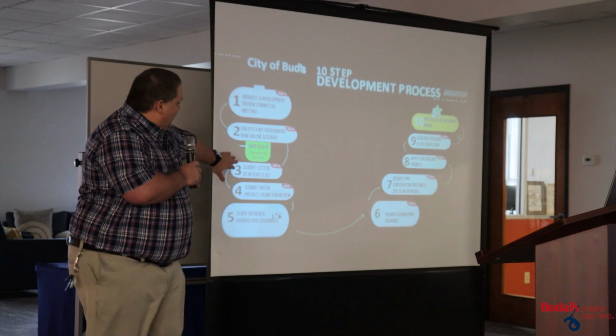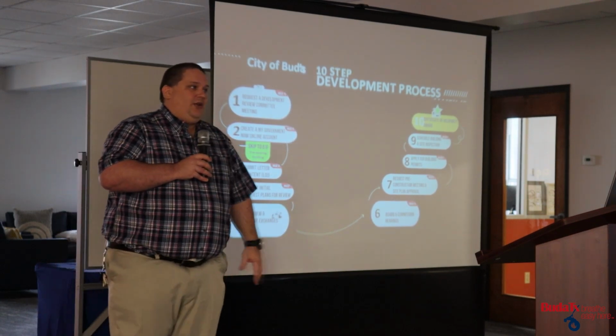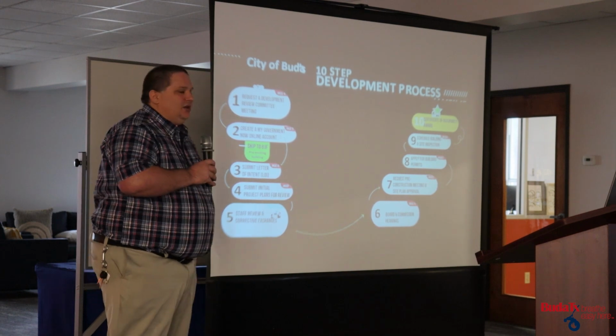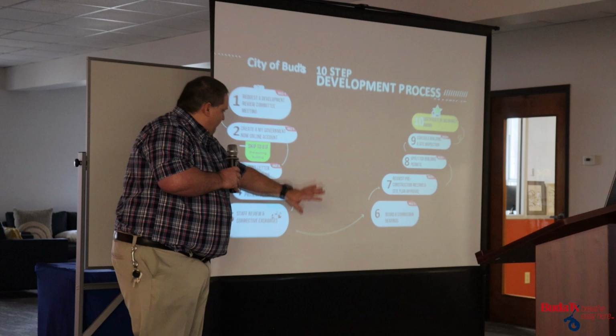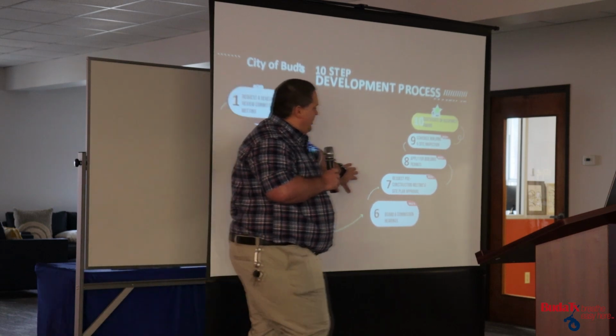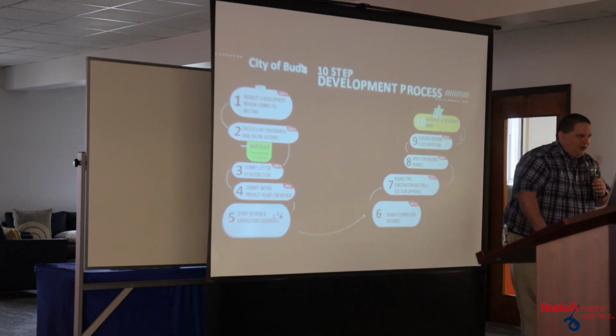But once again, I said, step 2, if you're not doing site development, if you don't need to go through HPC, if you don't need to have a plat, you can skip most of those steps. You can jump straight over here, where we're at now. Step number 8, it's applying for our building permits.